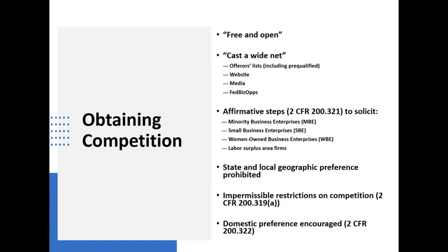It may make sense for an organization to periodically go out to the marketplace and say to the marketplace, here are the kinds of things that we buy on behalf of our own organization and perhaps on behalf of our members. We are interested in obtaining qualifications from individual firms or offerors who are capable of providing this. We're not making any purchases right now, but we want to have you on a list that when it comes time for us to make a purchase, we can go out to you and make sure that you get a copy of our solicitation and that you're aware of our needs.